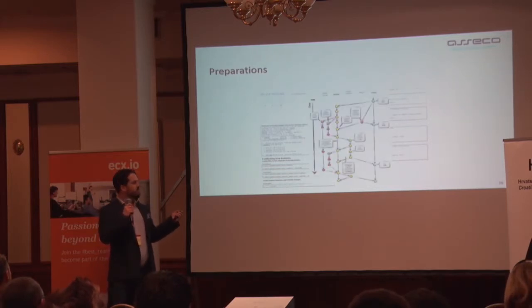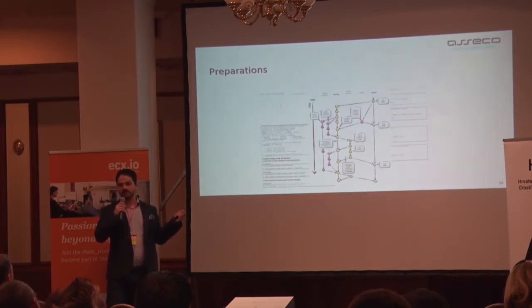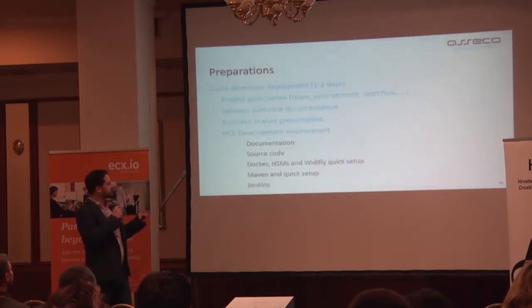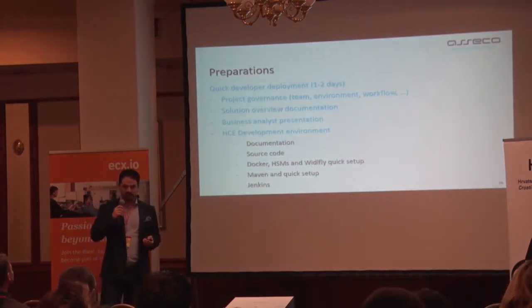And we identified, copied from the internet, this procedure that nobody can commit the code unless the architect reviews it, by using branching. And versioning had to be defined. So what was the benefit of this?